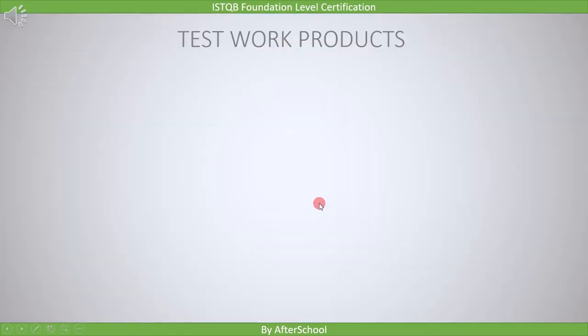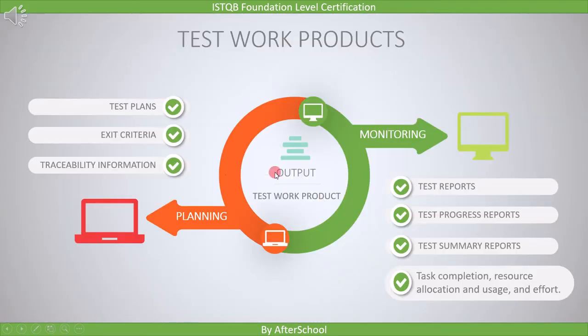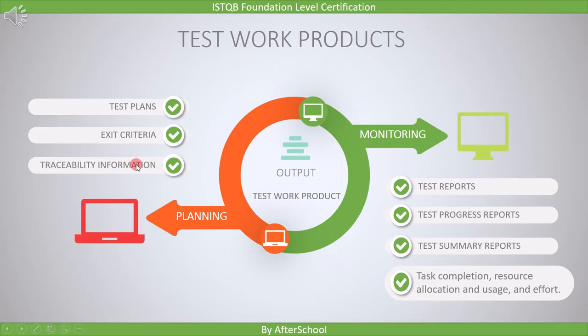Now let's see what is the output of the test planning and test monitoring phase. The output of test planning is test plans, which contain all the scheduling-related details, exit criteria — which tells when to say the test activity is completed — and traceability information, where we decide the link between test basis and the output of the test activity.